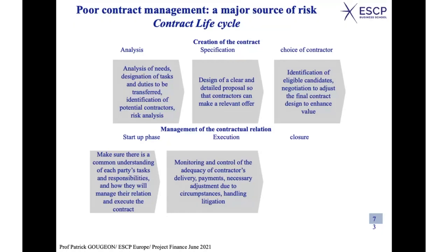And again, if there is no trust, if you have not built trust to start with, and the startup phase is also there for that, to try to build trust between people working together, so that when something happens which was not anticipated, okay, then they can sit together and say, well, we know how to work together. Let's go on. We're going to try to find a solution. If they are not able to do that, they will go through litigation with cost overruns and delays.